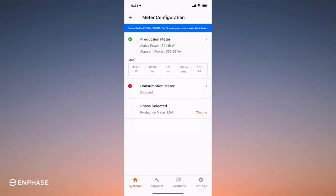Do not proceed with commissioning until you are confident the CTs are correctly positioned. Now that you are 100% confident, enable the production meter, and the job is done.